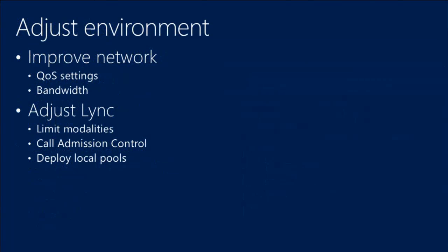Okay, so you've run your simulation. We always recommend to run this in production, and we run this usually for a full week, for 7 days, so that we can really see at any time of the day, we can do calls from one endpoint to the other. So we will have some probes that simulate calls and will give us this information relevant for real-time communication, what's the jitter, packet loss, and latency, and the QoS setting. So once you have the results, you can make different decisions.